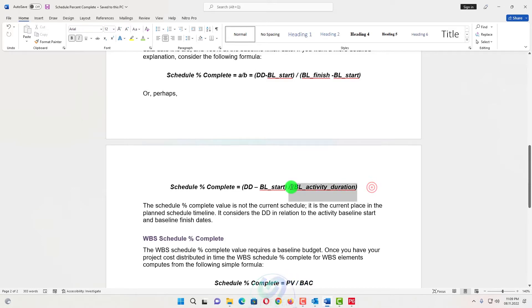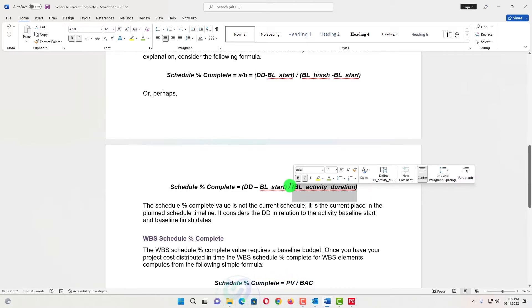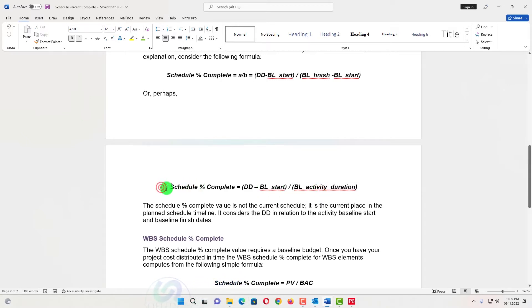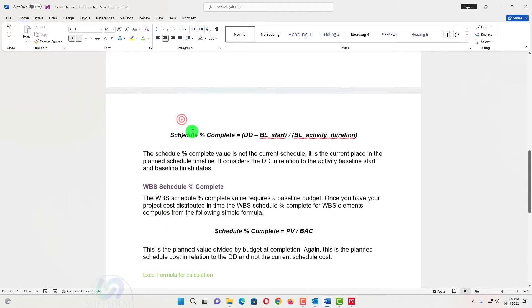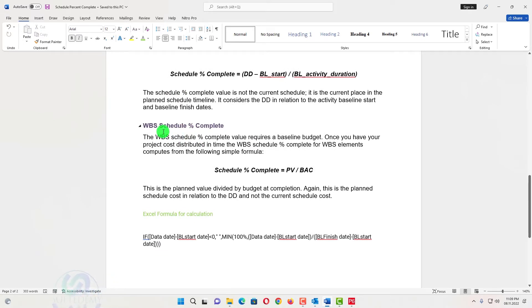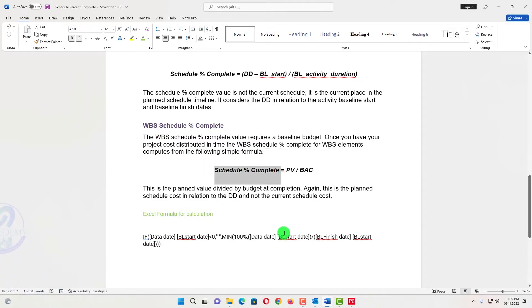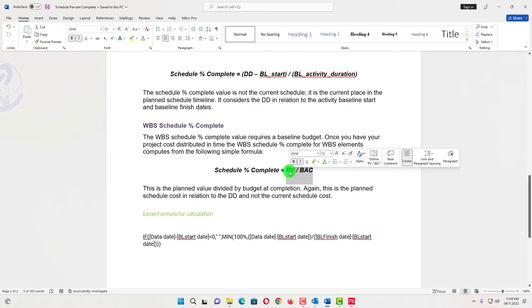This formula cannot be compatible if you have a calendar with a five-day week, because the baseline duration will be shown as less due to the calendar, making the result incorrect. Do not use this formula if your calendar is not seven days. At the WBS level, if you haven't assigned any resources or cost, schedule percent complete is calculated as earned value divided by budget at completion.